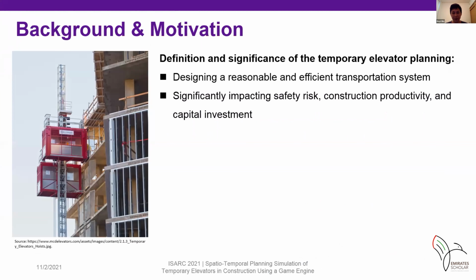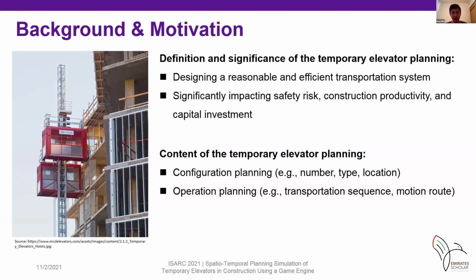Temporary elevator planning means designing a reasonable and efficient system to transport resources according to project characteristics and team requirements, because it significantly impacts safety risk, construction productivity, and capital investment. Temporary elevator planning is one of the important tasks in construction projects, especially for high-rise buildings. The content of this plan includes two main aspects.